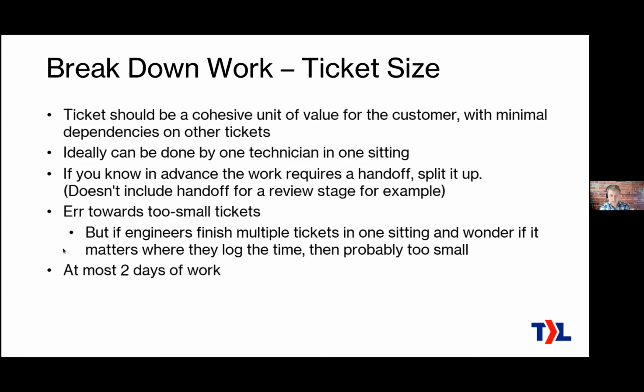Definitely at most 2 days of work. Basically no exceptions to this rule, unless maybe you're doing something that's really experimental. You really have no idea how long it's going to take, and you've got kind of a blank check from the customer to just solve this problem, whatever. That's the only exception. Other than that, always break it down to 2 days of work or less. So it's like 16 hours.